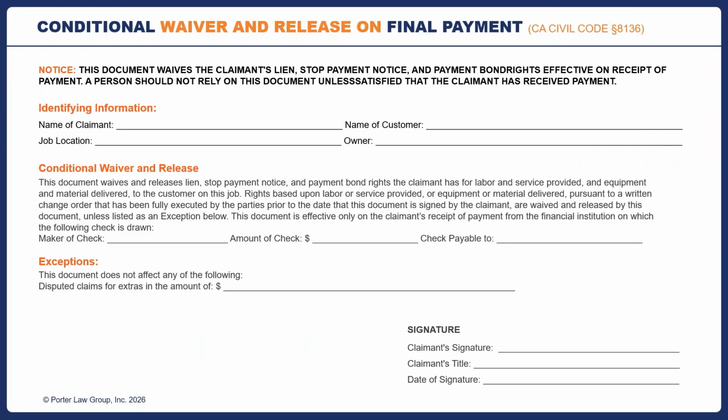Let's say change order number 6 is in dispute, and maybe the GC or the owner says, this is part of your scope. We don't think it should be a change order, and you disagree. So down here you could write in a dollar amount, let's say $12,580 regarding disputed change order number 6.